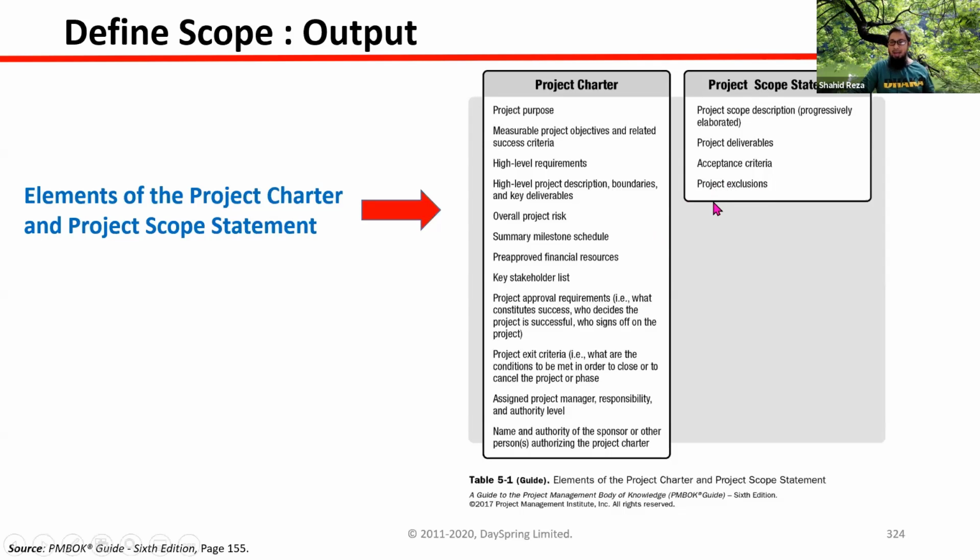But if you write this at the beginning when you are fixing the scope, that these are the things excluded from the project delivery, then you have to learn how to say no. This is very important: how to say no. These are not part of the project, and you have to mention them in project exclusions. If there is any argument or conflict, it should arise at the beginning of the project, not at the end, because that will be costly.